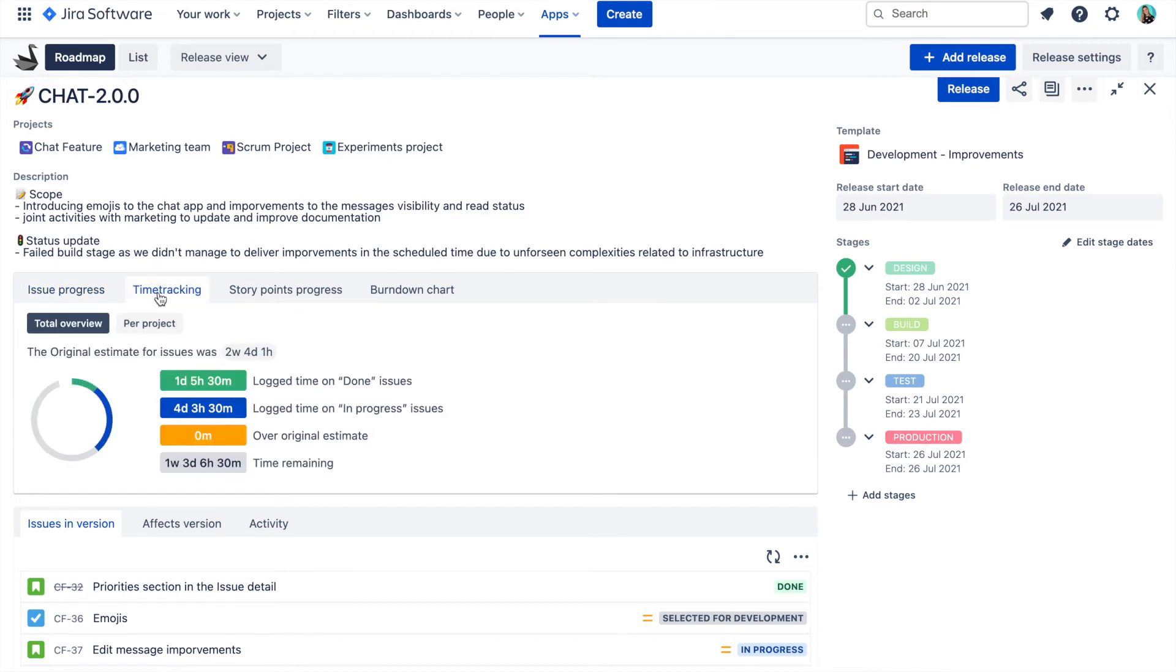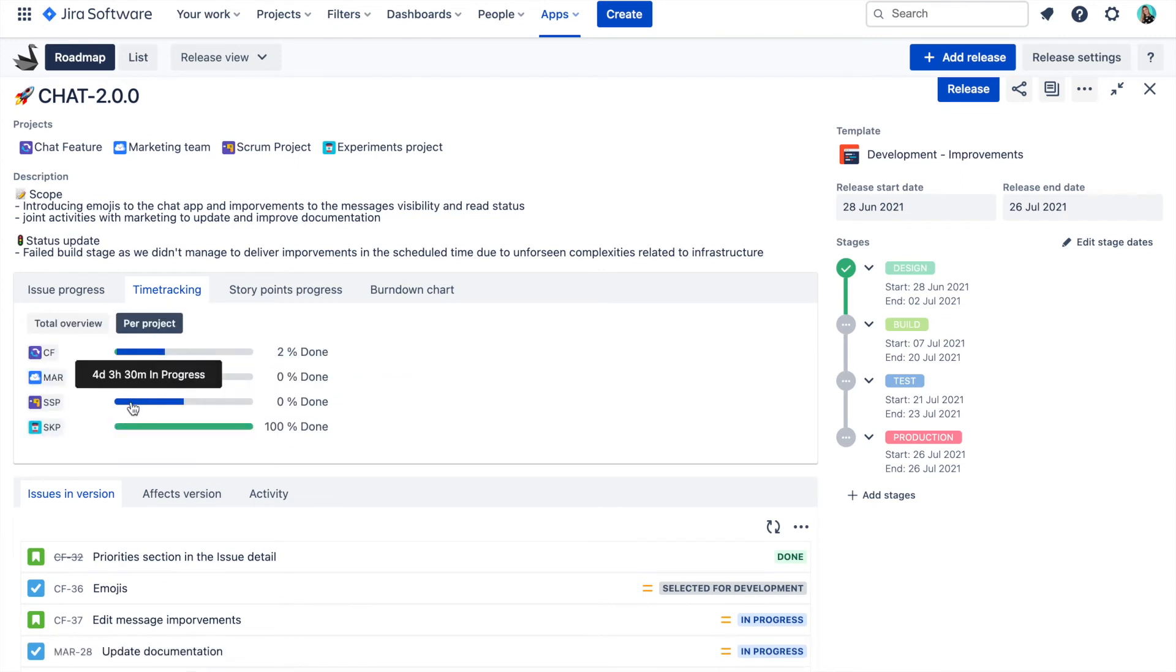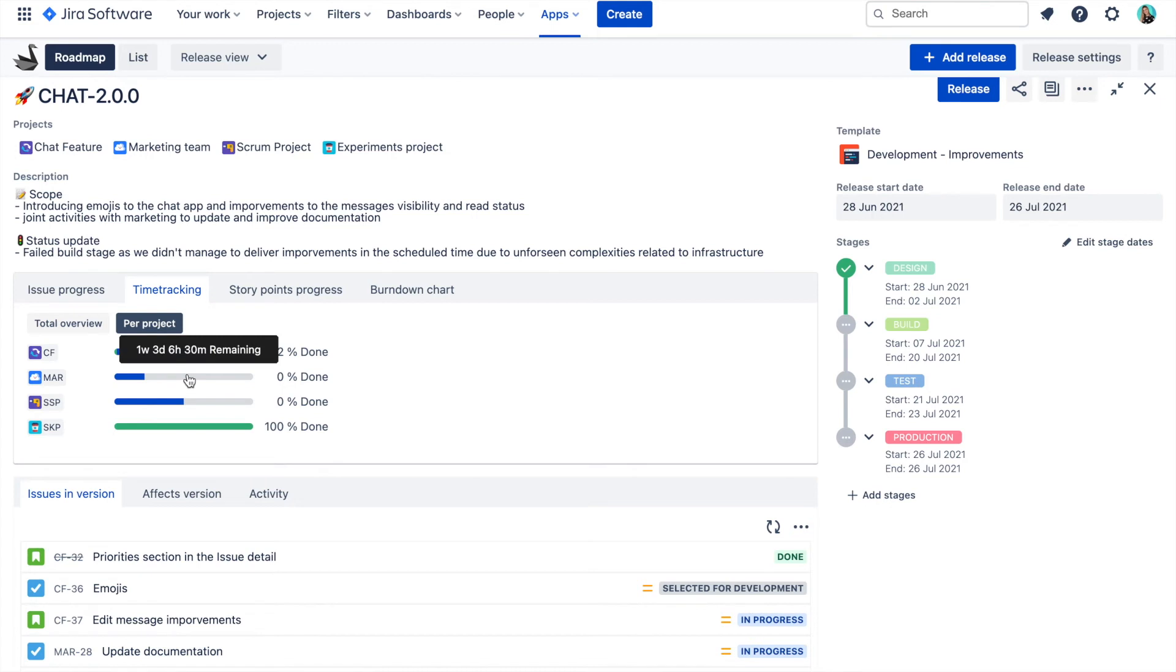If you are using Jira default time tracking feature, you can use this report to see the time spent on this release, the original planned estimate and how much time is still remaining. And if you want, you can see the time tracking per project too.